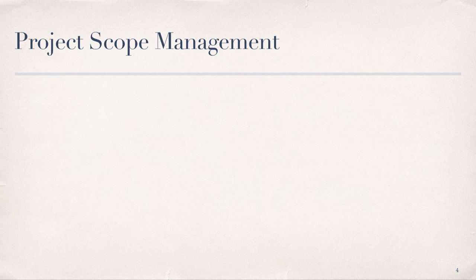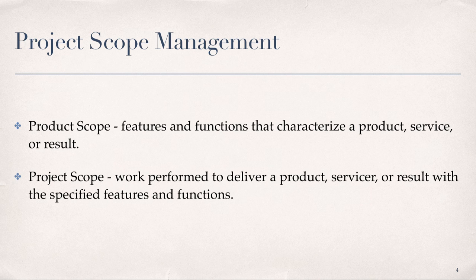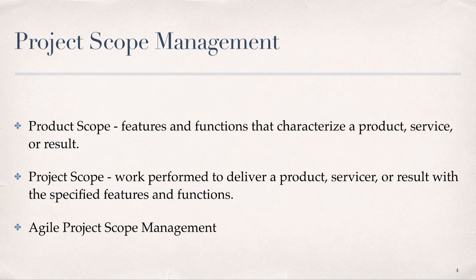This brings us to our discussion of project scope management. There are two parts to this: the product scope, which specifies the features and functions that characterize a product, service, or result, and the project scope, which encompasses all the work performed to deliver a product, service, or result with all of the specified features and functions. The term project scope is often used to be inclusive of product scope. In an agile lifecycle, product increments are developed using multiple iterations, where a detailed scope or sprint backlog is defined and approved for each iteration during sprint planning.